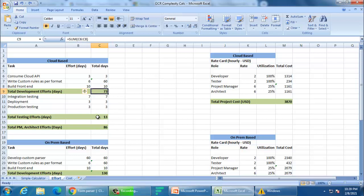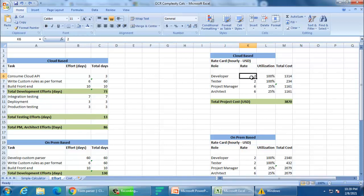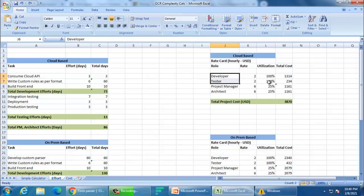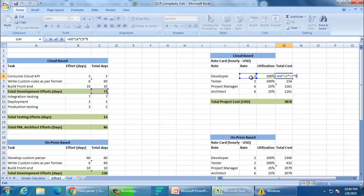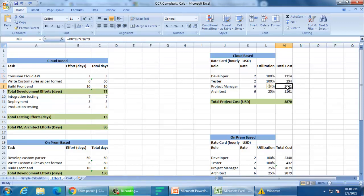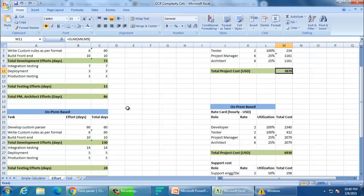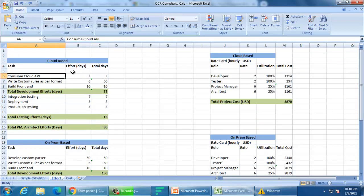Total up all the days: 86 days overall, 73 days for the developer, and 13 days for the tester. Now the cost — this varies company to company. In our hypothetical company, developer cost is $2 per hour, tester is $2 per hour, and a project manager or architect is $6 per hour but only occupied 25% of the time. Developer and tester are 100% utilized. Multiply the rate with utilization and number of days — your developer cost, tester cost, and PM cost come together. Your total one-time project cost for a cloud-based solution comes out to be $3,000.